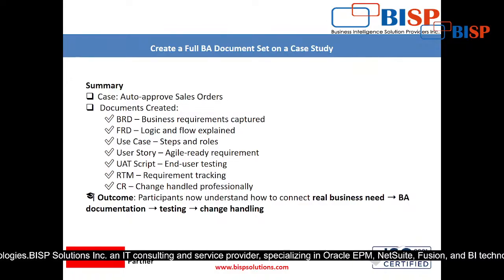Here there is one more document, that is the closure report document, the project closing document, right? In that document also, you have to write down what was the project, why these changes were needed, what we have done in that project, and finally what was the outcome, the reaction from the stakeholders. Everything will be documented in that document, right? That is the closure report.